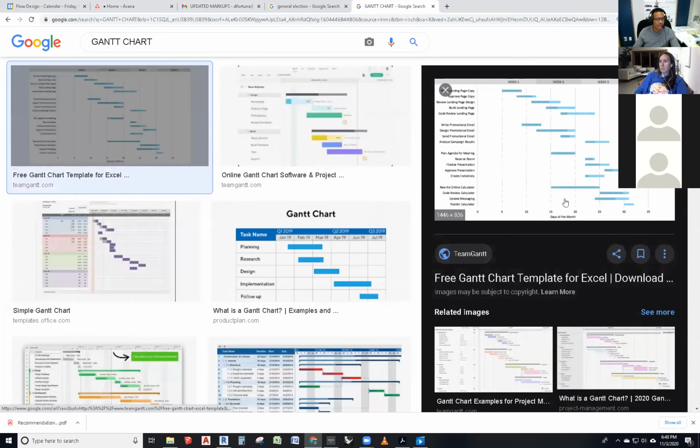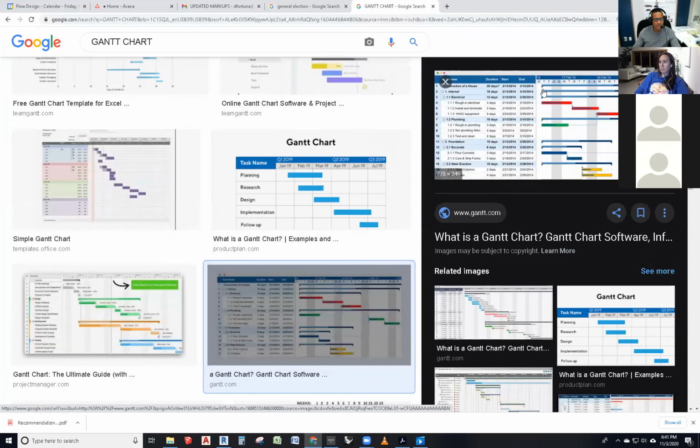So Gantt charts are tools that we use to know when one event begins and when another event continues and how they work together, how they overlap. And the critical path method is kind of like the longest path within the whole chart, because that's the one that will take the longest. That's the one that will tell you when you really will finish the event. For instance, this whole thing is showing a critical path, this one right here, right? It's the longest path among all of these different pieces.